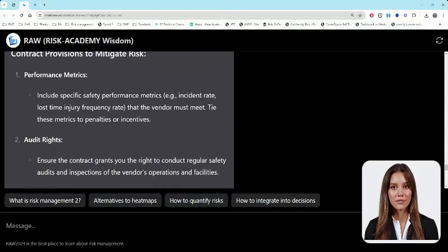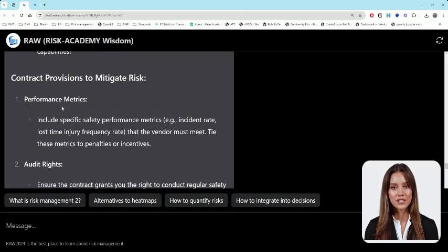The whole idea of identifying risks as part of procurement is to know your risks up front for each significant contract. This allows you to either eliminate these risks or mitigate them through existing service level agreements or contracts. If a risk cannot be mitigated, disclose it to the decision-making body, saying, "These are the risks we have identified."